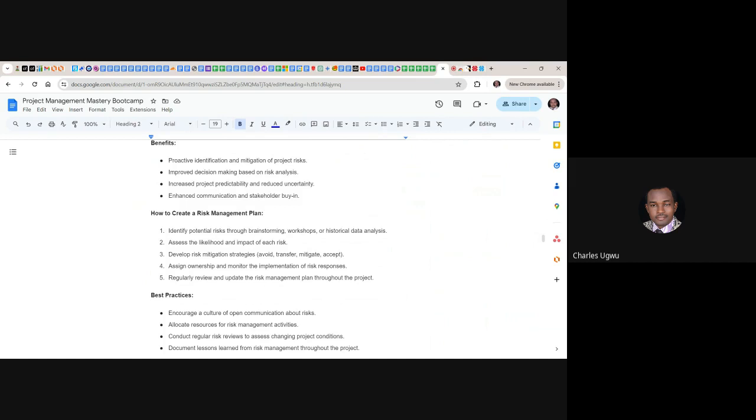So in this case, as a team member, it means we'll have to be having regular brainstorming sessions. And that's why when I was talking about RAID, I said in the past, some of the projects I managed, we use what we call a RAID meeting. A RAID meeting becomes a weekly meeting we have in order to brainstorm and document risk. Not only documenting risk, but mitigating the risk within the RAID meeting.